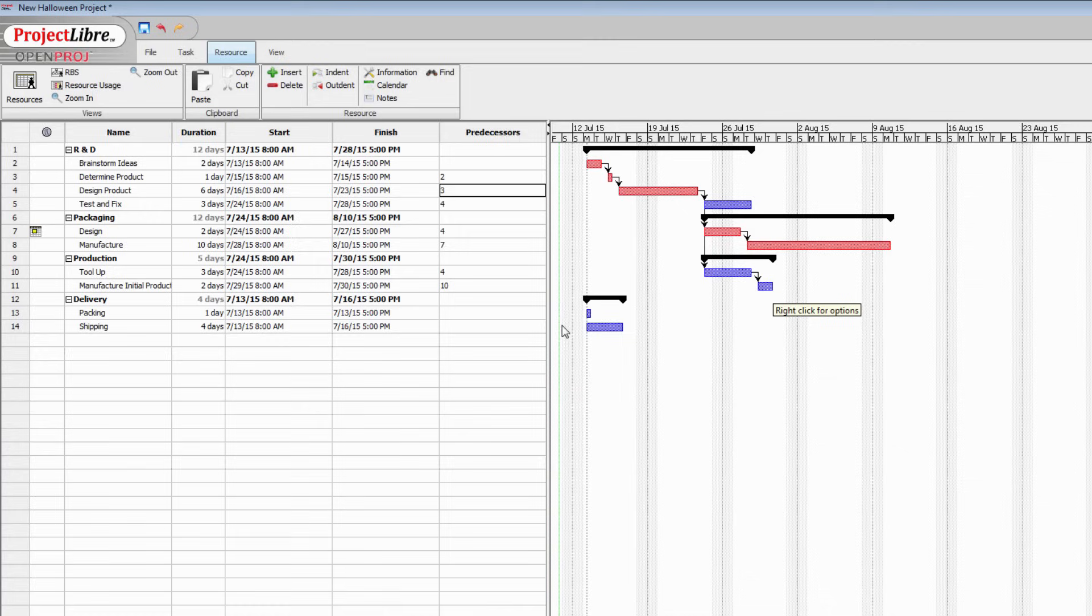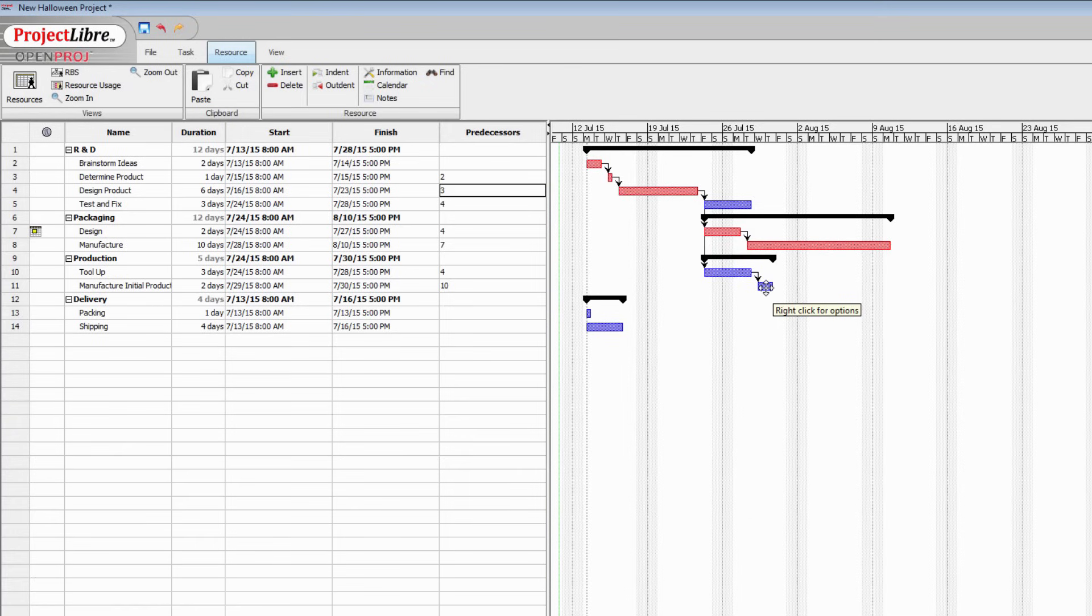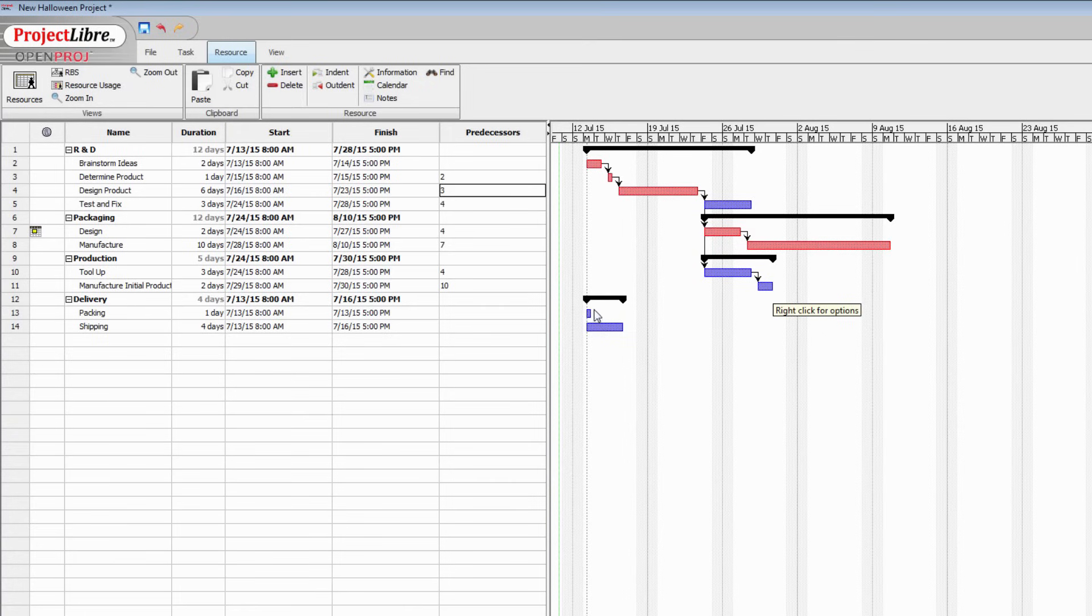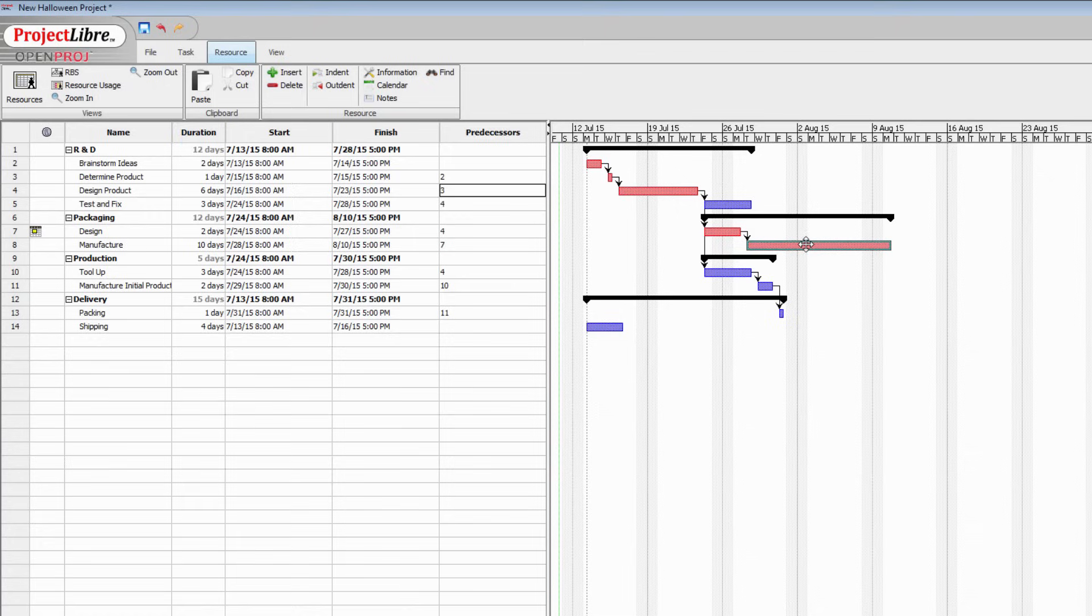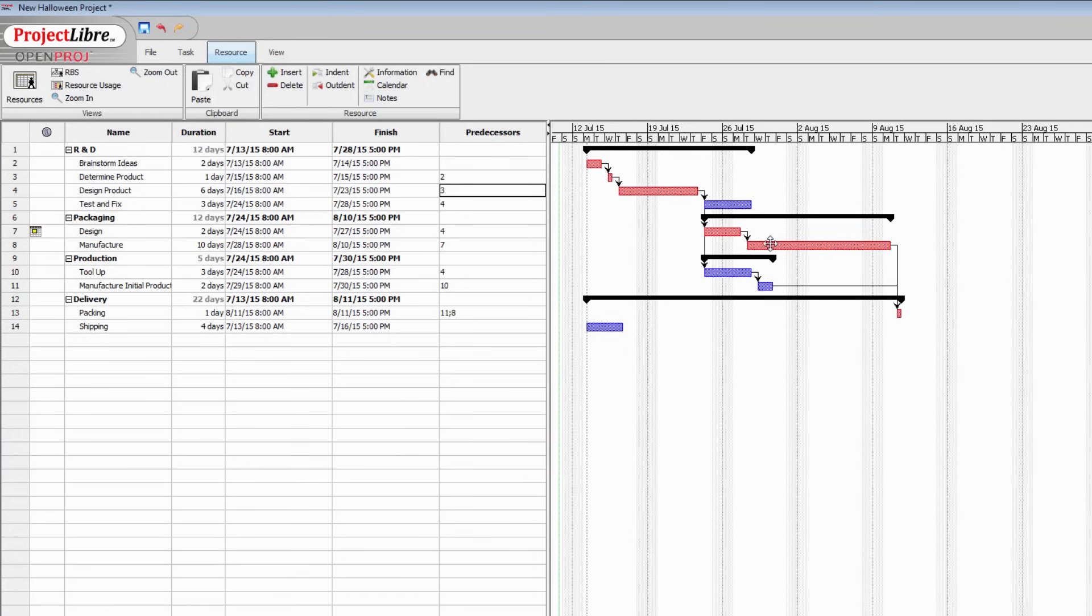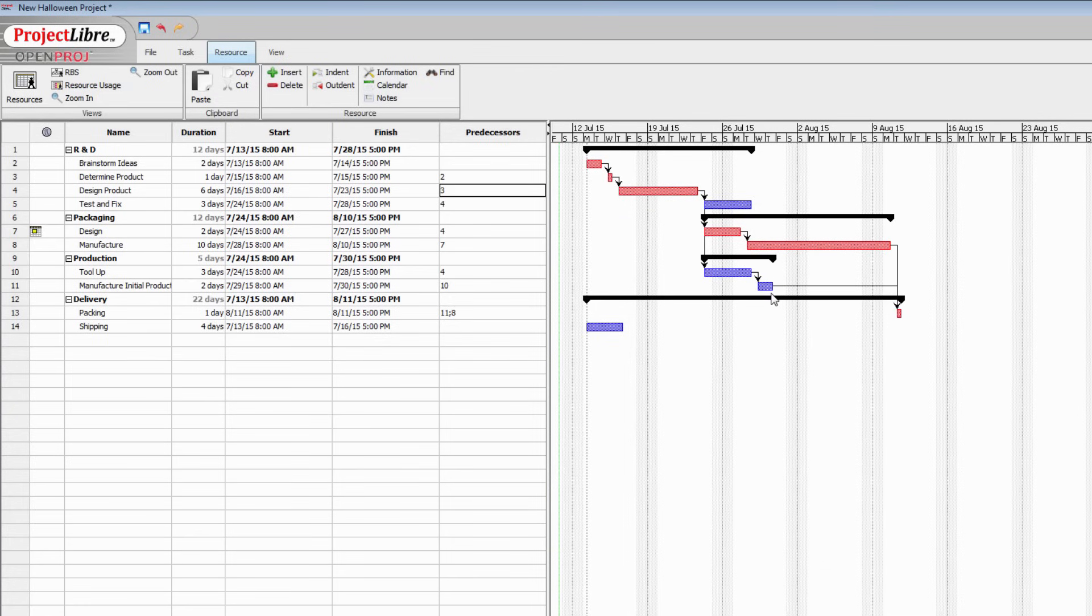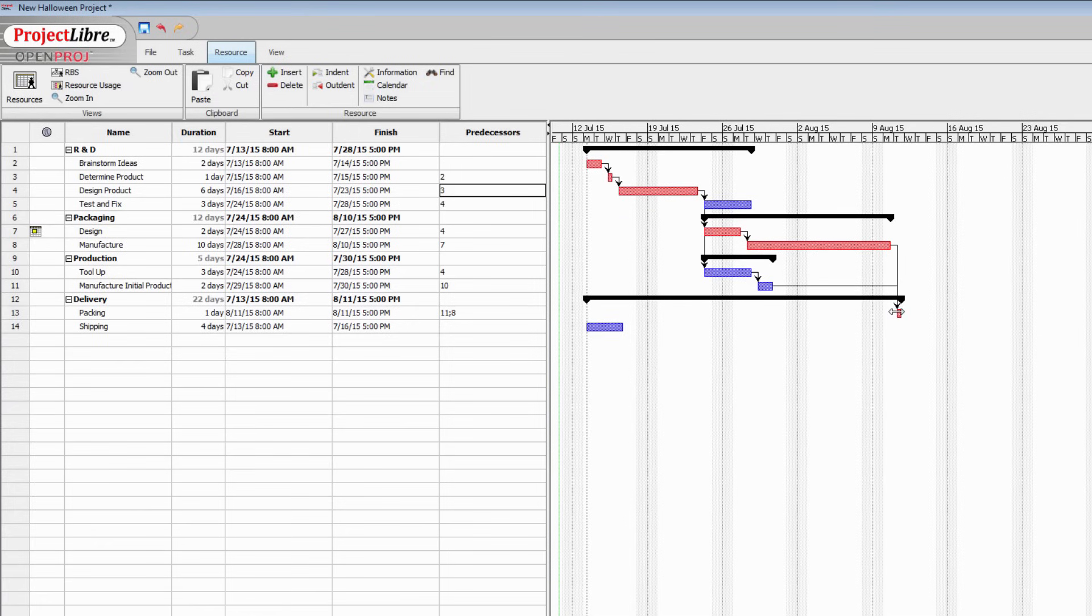In terms of packaging, well we can't start packaging the product until two things have happened. Firstly, we've got some product to package. And secondly, we've got the packaging to put it in. There are a couple of things that this item is dependent on. So I'm going to create both of those as dependencies. Drag and drop for one of them. And then drag and drop for the second one. You can see its starting time is being affected by the packaging right now more so than producing the initial product. And of course we can't ship our product until we've packaged it.